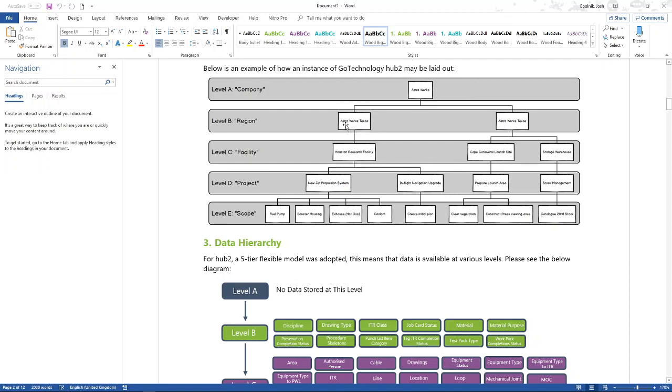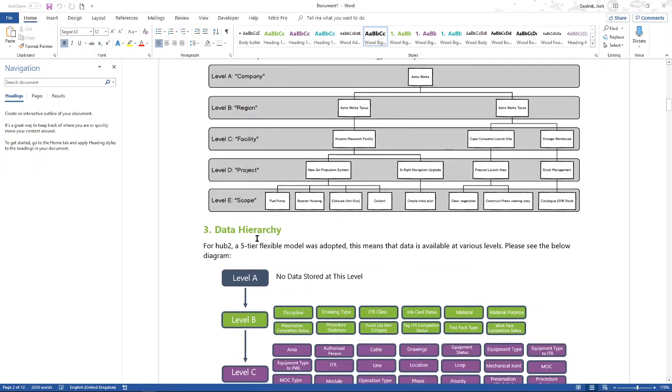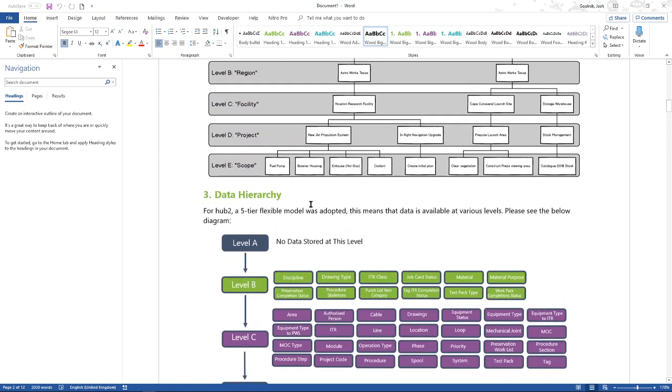So if we come up with a list of disciplines that's, let's say, A, E, and Z, when we set it there, everything underneath that will have the disciplines A, E, and Z. And similarly, over here, we set a discipline list that's B, F, and M. All of these below here will also have that discipline list. So the information flows down, and as you go further down, you get further options.